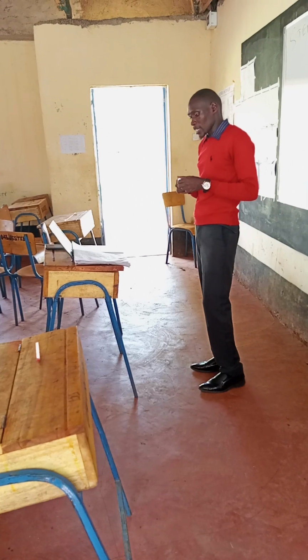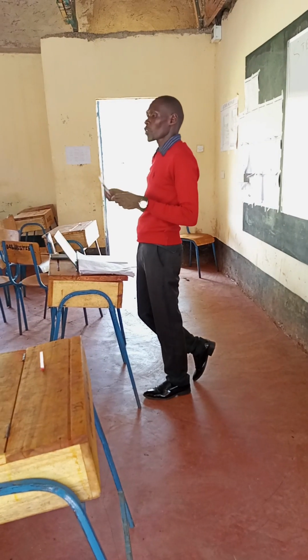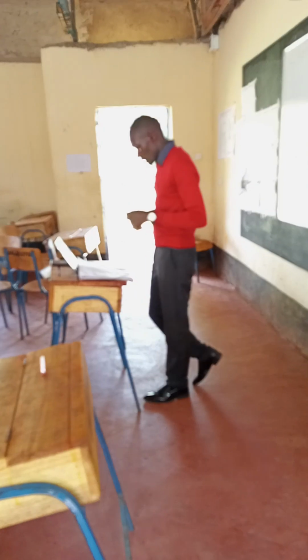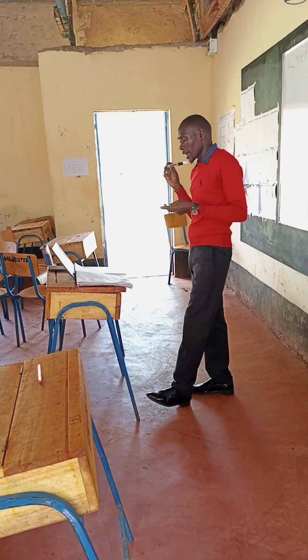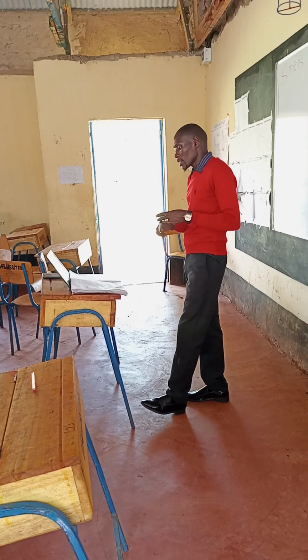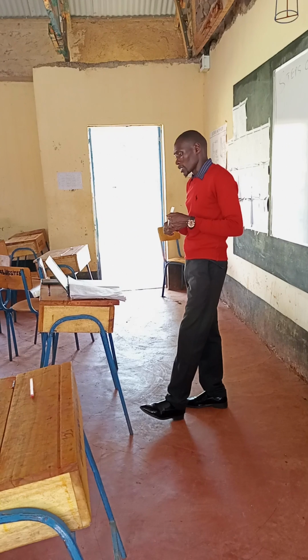The eighth step is the inspection and testing. After doing that installation, you need to test it. This is by checking proper voltage at sockets, no short circuits. You also need to check the correct polarity. You also need to check continuity.